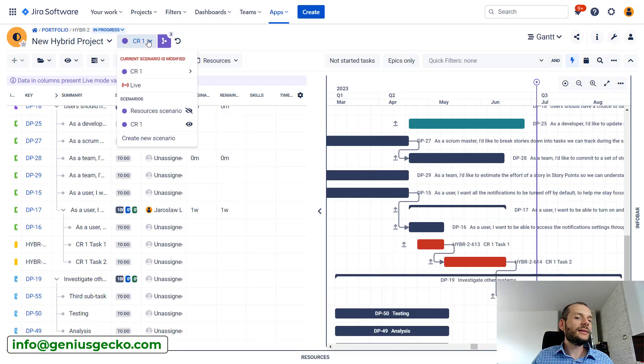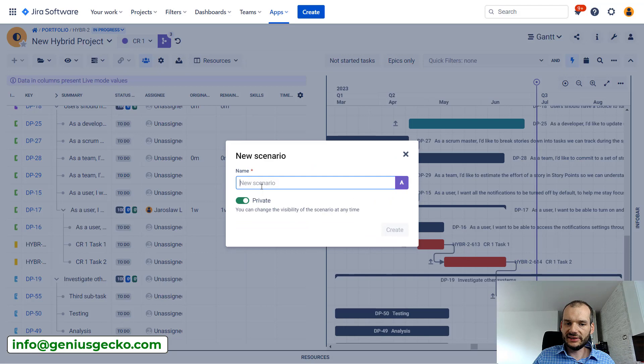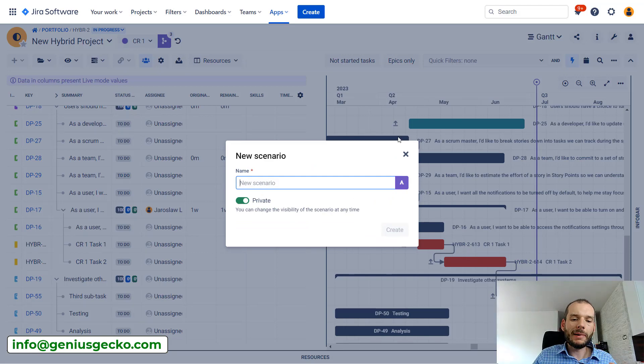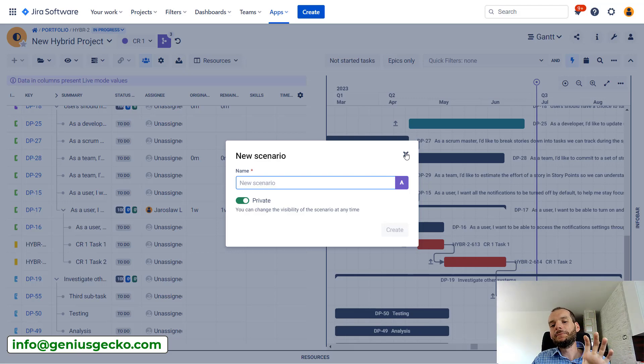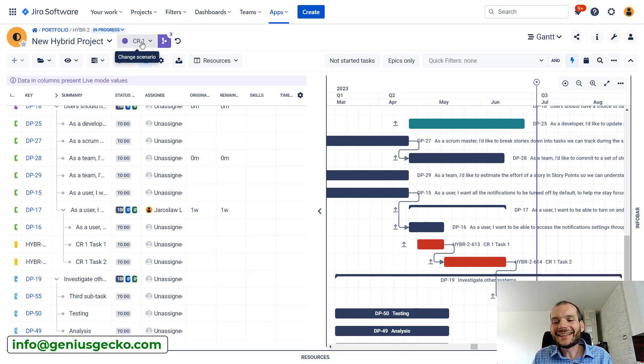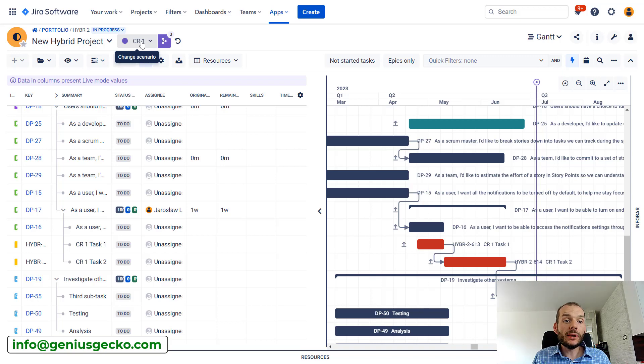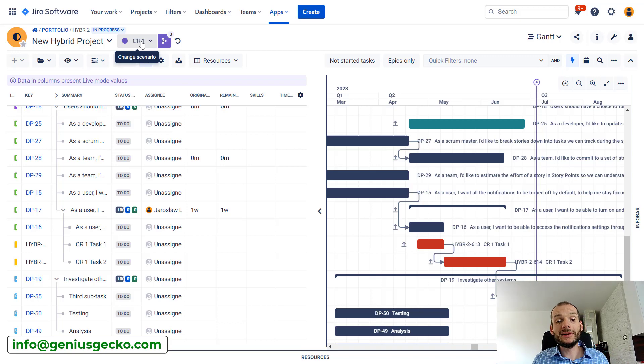And yeah, basically when we create the scenario you could see that we could create a private one or public. So for public stakeholders, if they have right permissions in the box, they will see this scenario. They will be able to access it and see what is the proposal for the new plan. If they approve it, we can merge it to the live scenario.